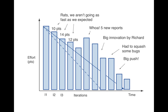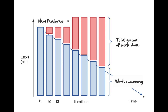And, of course, like all things in Agile, you're free to take this and make it your own. One tweak I like to do is to take the burndown and display total work done each iteration — that's what you see in the red here. This lets me look at the chart and immediately get a sense of whether I'm a quarter, a third, or halfway through the project.